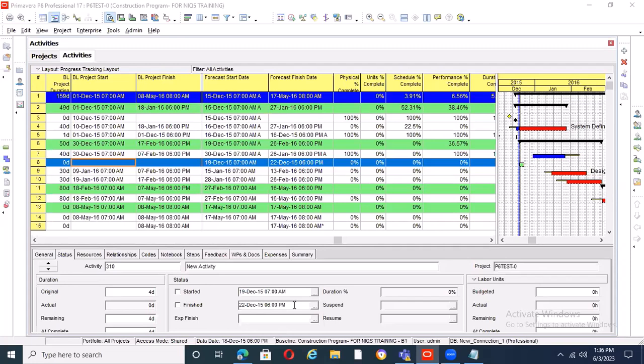So that's why I said when you're signing a contract, please be careful, especially in a volatile economy like Nigeria. If your contract is in dollars, the fluctuation rate is small, so it won't affect you that much. But if it's in naira, man, you are in deep soup. So that's it.